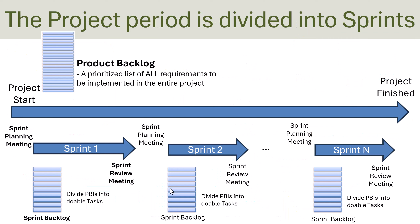Basically in Scrum, the project is divided into smaller parts called sprints. You have the project start, the project finish, and the entire project is divided into sprint one, sprint two, sprint three, and so on until the project is finished. The product backlog is a list of all requirements to be implemented from start to finish, but in each sprint they take just a part of the product backlog — called the sprint backlog — and work on those items.